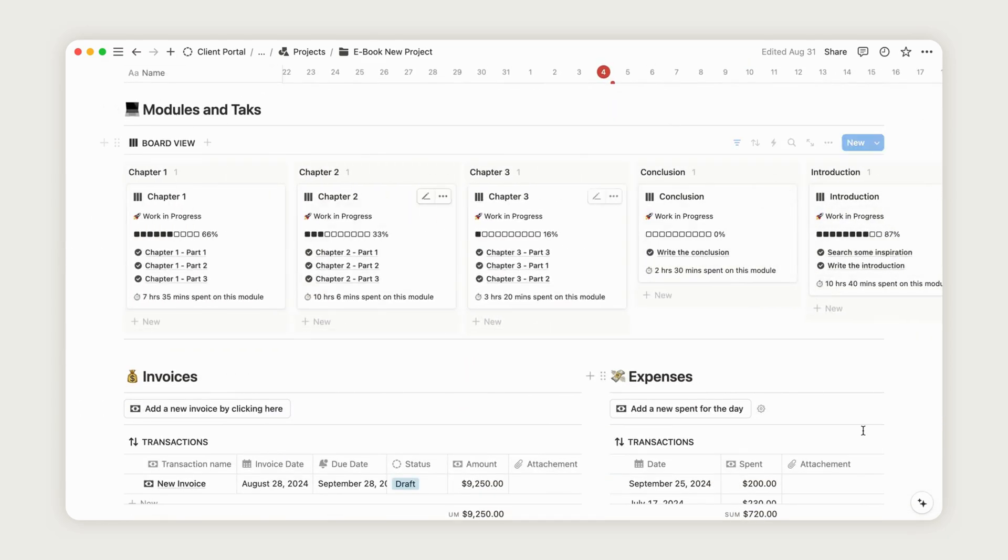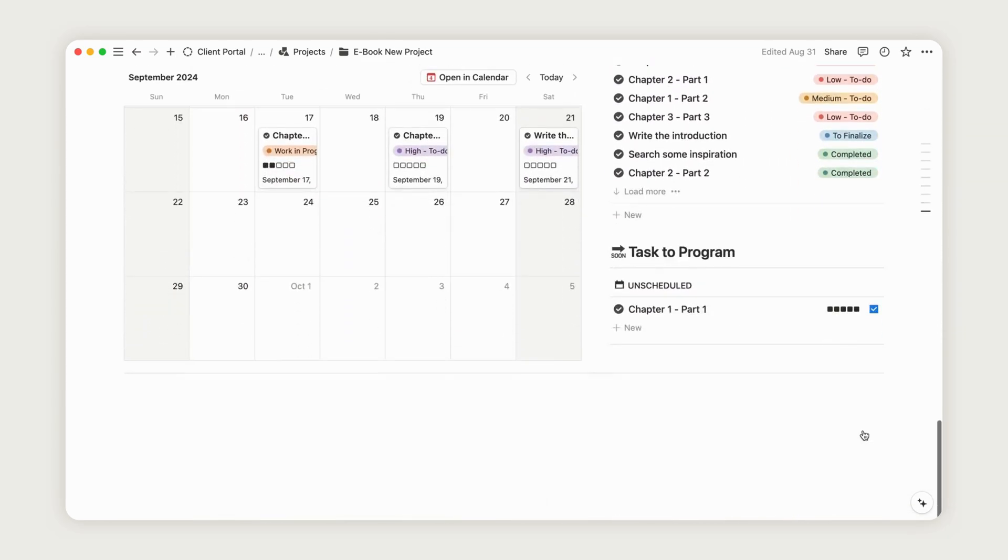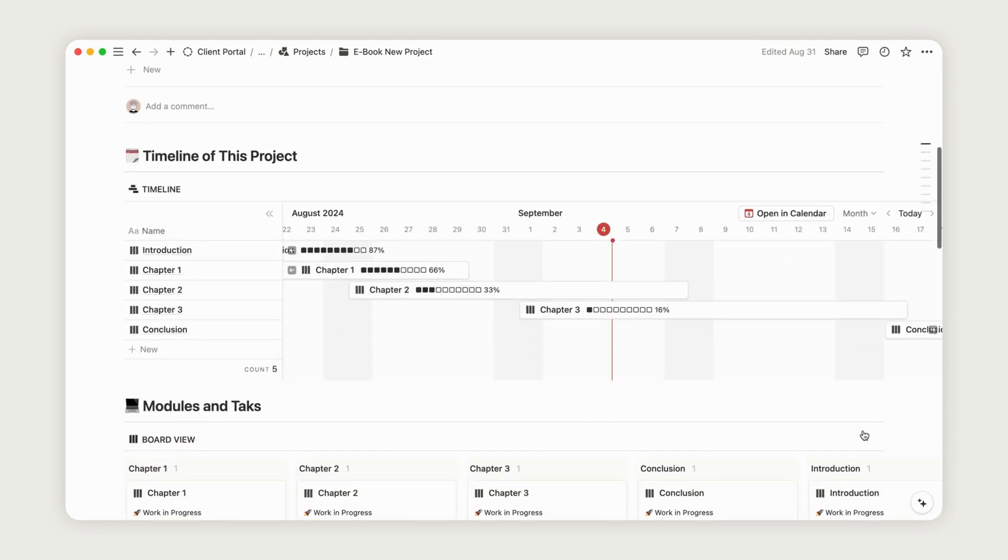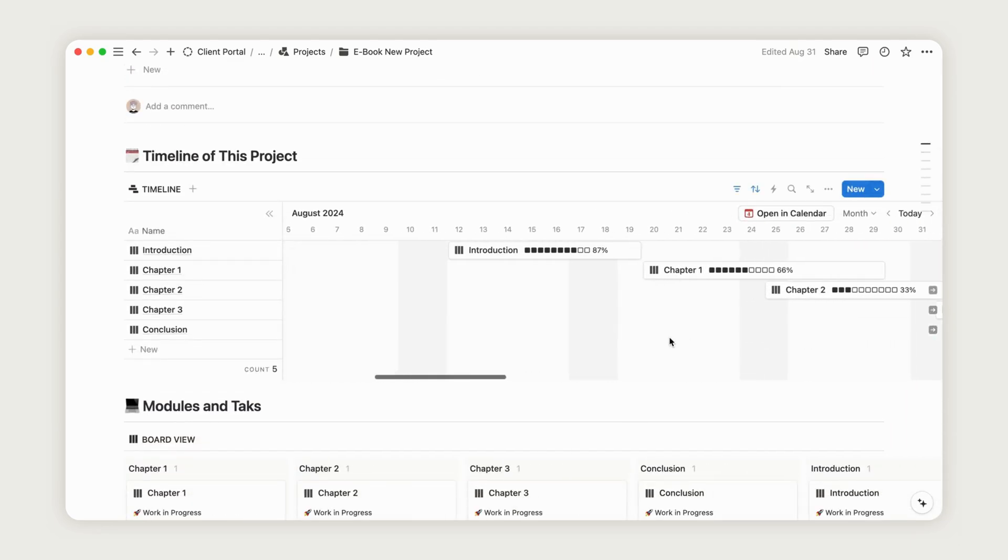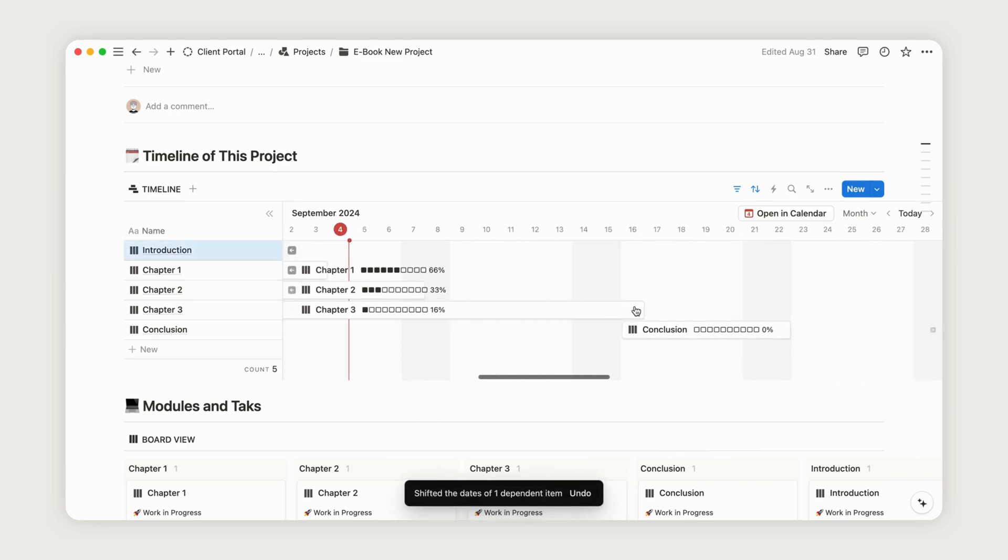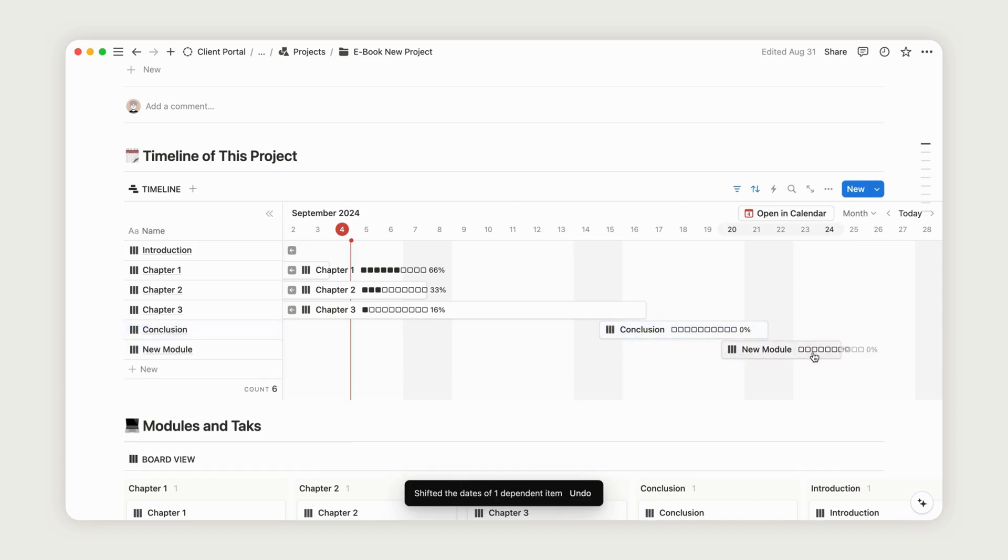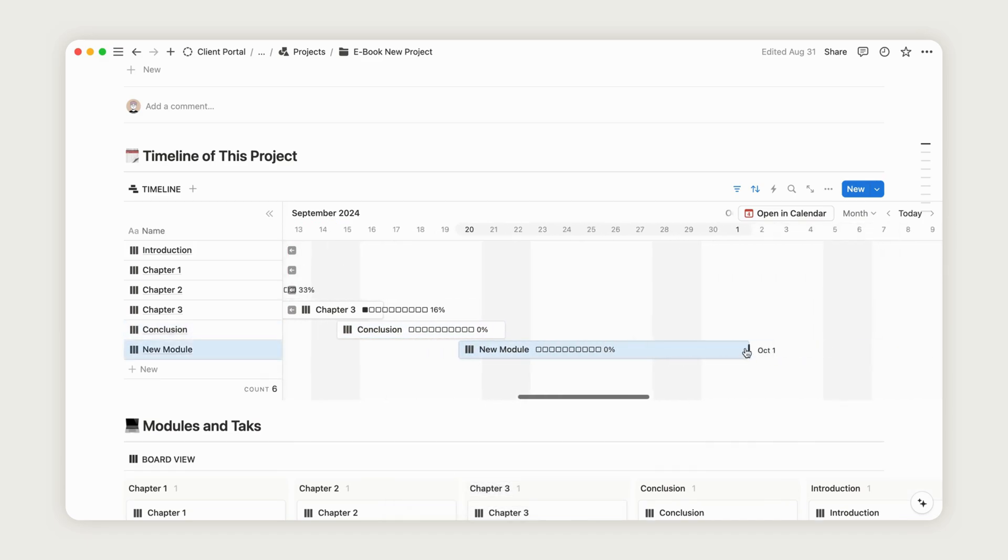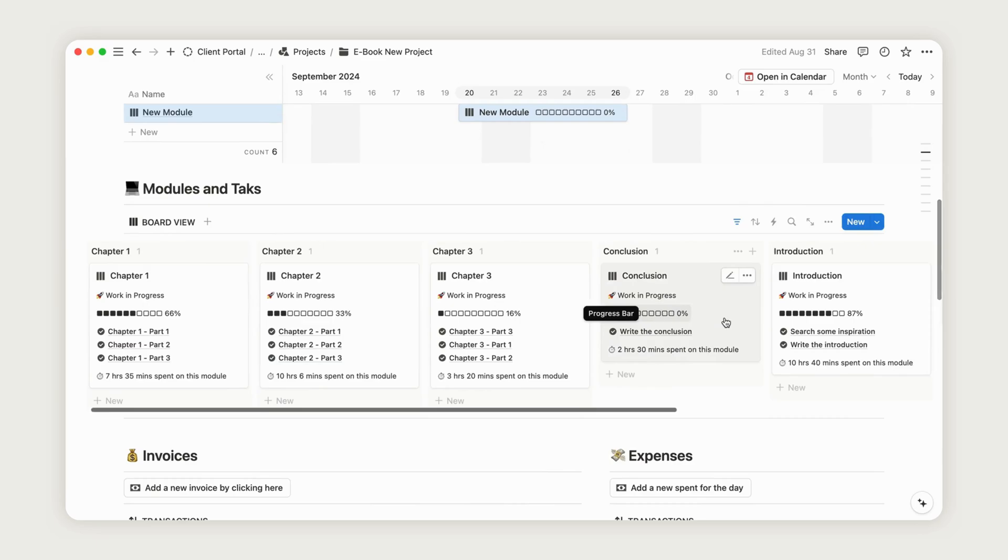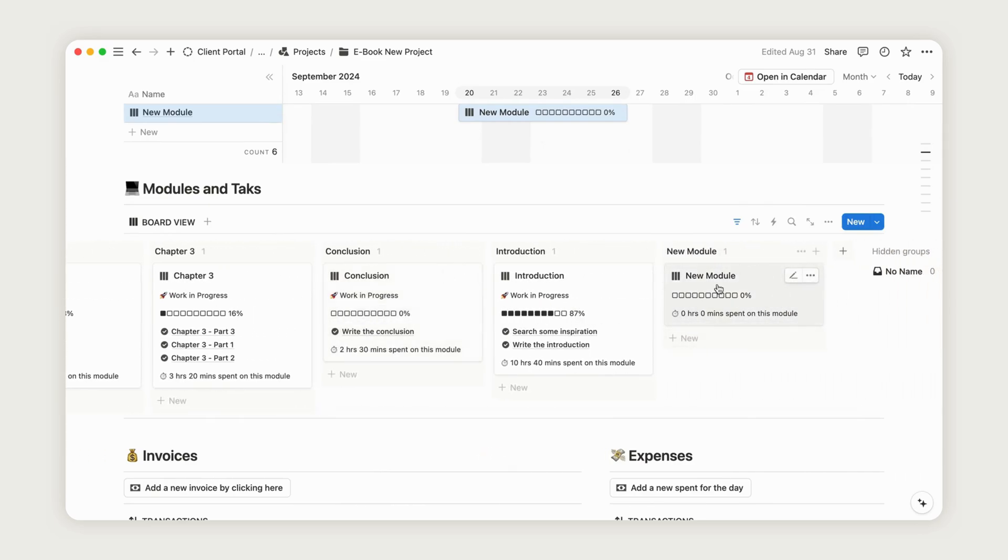At the top of your project dashboard, you'll find a timeline where you can outline different project phases to break down the workflow. To add a new module, click on a start date and drag it to the end date. Once the module is created, give it a title in the provided space. All your modules will be displayed in the Modules and Tasks section, providing a clear overview of the project's progress.